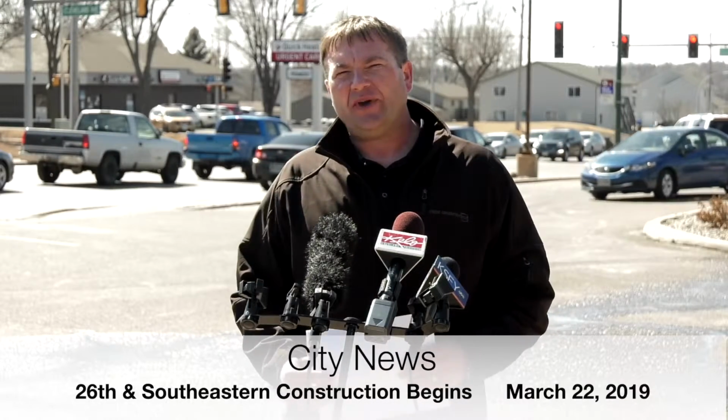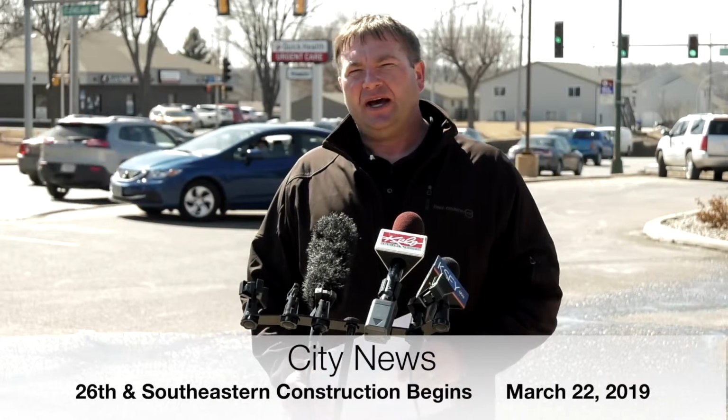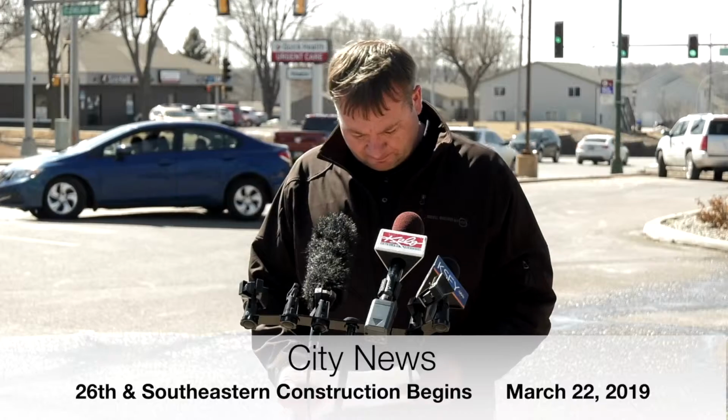During construction, we also have a series of overnight closures. We have 16 days set up in our contract to close 229 between the hours of 8 p.m. and 6 a.m. for various overhead structure work at the Exit 5 bridge. During that time, traffic will be detoured to the 10th Street interchange to the north and the Cliff Avenue interchange to the south. Those won't be consecutive nights. We expect some of them will be, depending on the type of work.